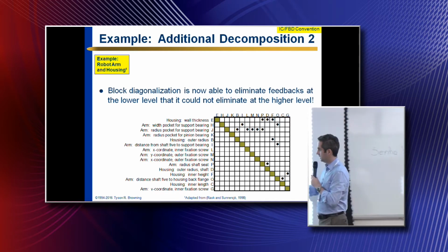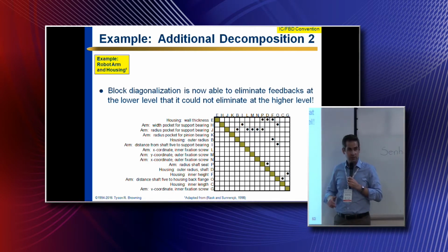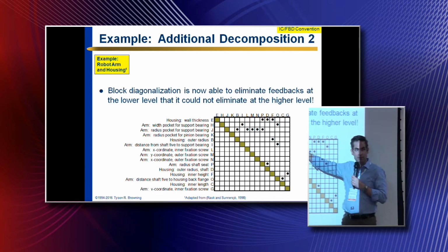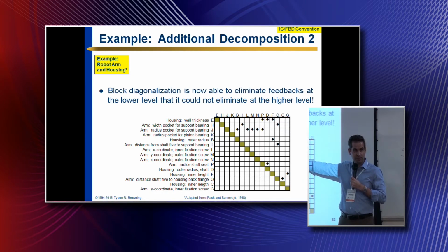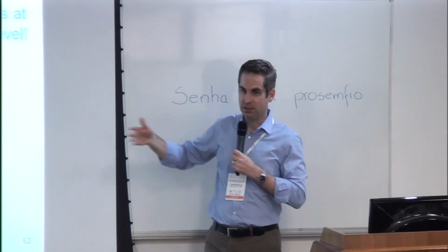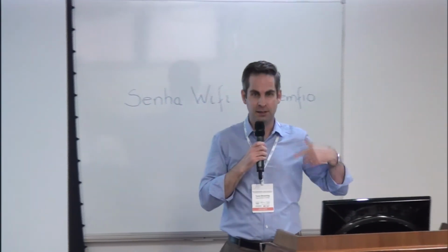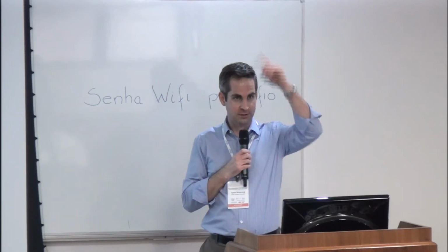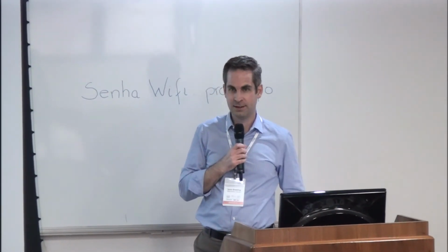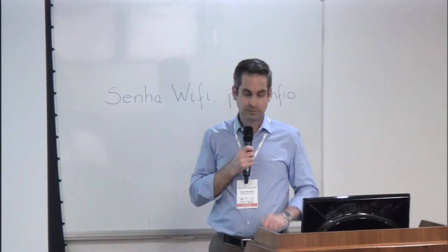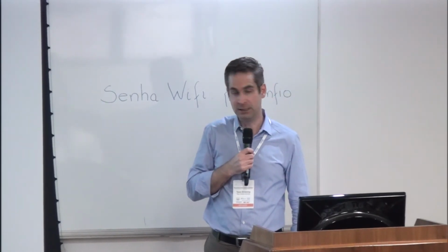And if we can go in and define the work in a greater level of detail, we can often find that some of the work or a decision by one team needs to happen, then some work and decisions by the other team should happen next, and then it's back to the first team to do some more work and make some more decisions. And if we understand that process well enough, then we don't necessarily have to iterate to find a solution. But it would look like iteration if we just took these original two teams and told them, hey, go work together until you figure out how to do this. So there is a lot of unnecessary iteration and rework in a lot of projects and processes, that these types of models can help illuminate and eliminate.